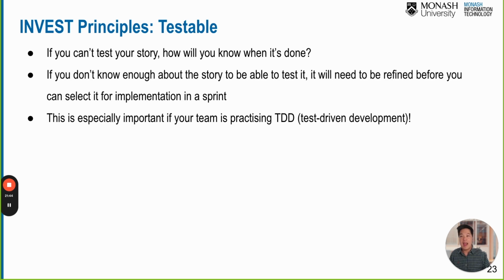Okay? And the last thing, the T in the INVEST principle, it should be testable. Otherwise, we wouldn't know whether the user story is met or not, okay? And if you cannot test the user story, we will not know at all whether it is actually done or not, okay? And later on we will talk about test-driven development as well.